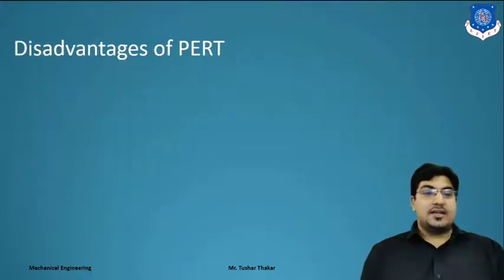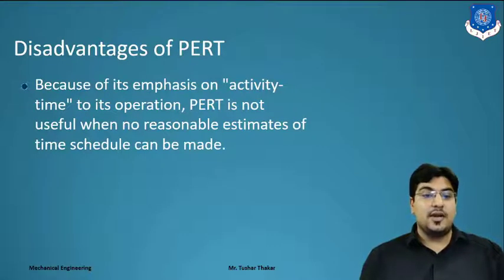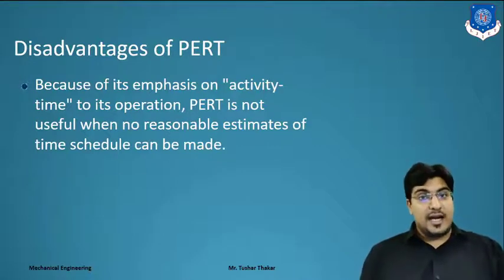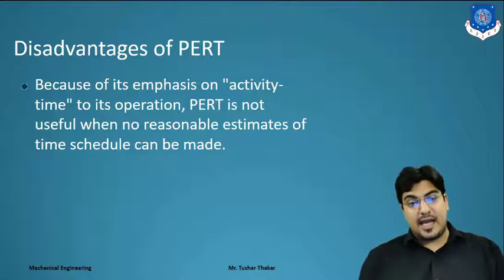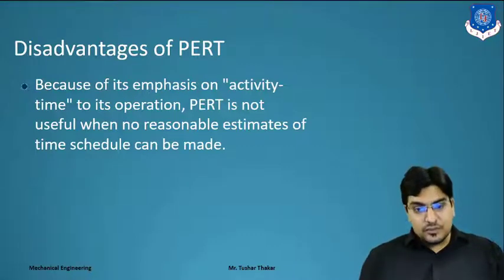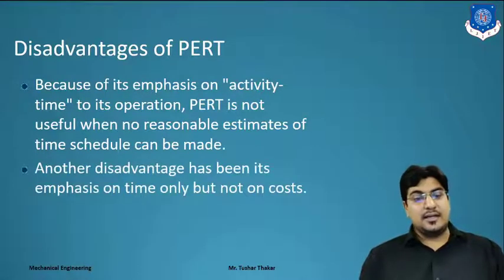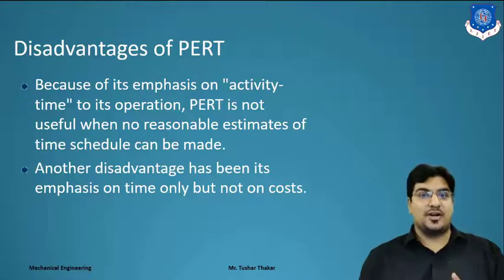Clear? Now what is the disadvantage of PERT? Because of its emphasis on activity time, PERT is not useful when no reasonable estimate of a time schedule can be made. Which means if we can't make an expected time schedule, then it is not possible to complete a project in PERT. And another disadvantage is its emphasis on time only, but not on cost.